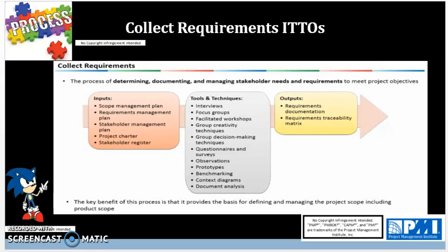Majority is the greater than 50% rule in a voting session. And basically that means if a question was asked and people voted for a specific feature, greater than 50% results in taking in that requirement for the project.